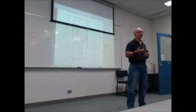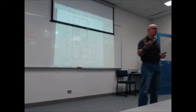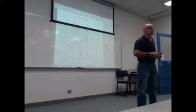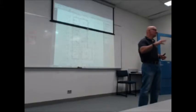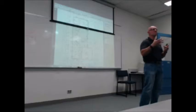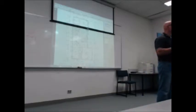So you're asking the client, what do you want, porcelain, ceramic? Cheap, mid-range, high-end. Cheap is $20 a square meter, $25 a square meter. Mid-range, we'll see $50 a square meter. High-end, the sky's the limit. Okay? So normally you're going to be worth $50-$60 a square meter. Porcelain, $60-$70 a square meter. It doesn't really matter. You're normally at the price that they've agreed to. That's all you can do because you don't know. Okay?